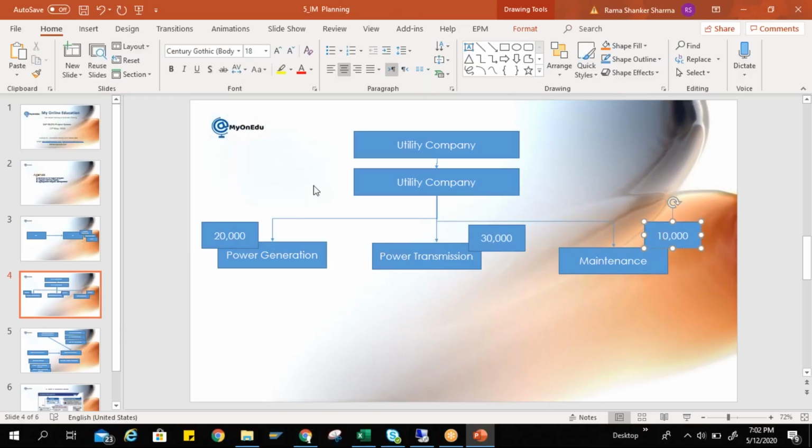You can plan cost directly here, the plan values, and then you can decide your budget and then you can distribute it. That is a one way. Or you can get your all the roll-up values based on the appropriation request, which I have explained earlier. Okay, so I have explained how you can create a proposals in the form of appropriation request when any new project is coming. So I'm saying it is a proposal.